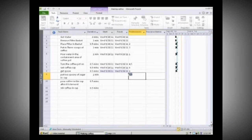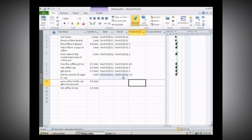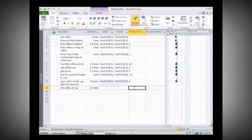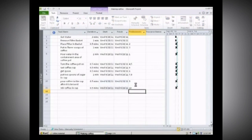Actually, it should have been 7 comma 8 — that's an easy mistake to make, and you will get an error message if you do make that mistake, so don't let it worry you. Now we want to pour the coffee in the cup — we have our sugar in and our spoon — so that activity follows number nine. After we get the coffee in the cup, then we want to stir the coffee, so that follows activity 10. We've just created a Gantt chart for getting a cup of coffee.